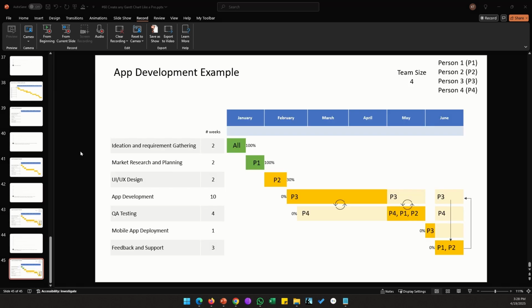So once you make updates, our chart could look like this. Here, my first 2 tasks have completed, so I have changed the color to a green and updated the percentages to 100%. Any changes we make to this project as we go along will have to be reflected in this chart. For example, later we realized that the scope of the project is a lot larger than we thought, so we decided to add another member. That member will have to be added to this chart.